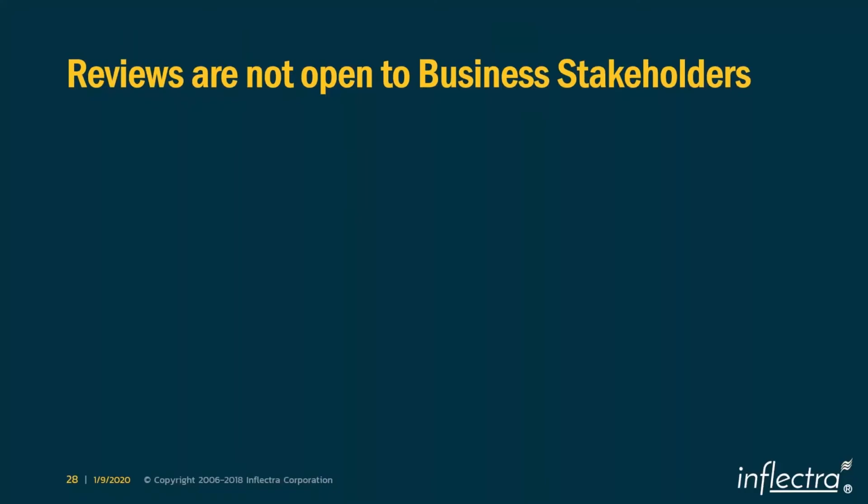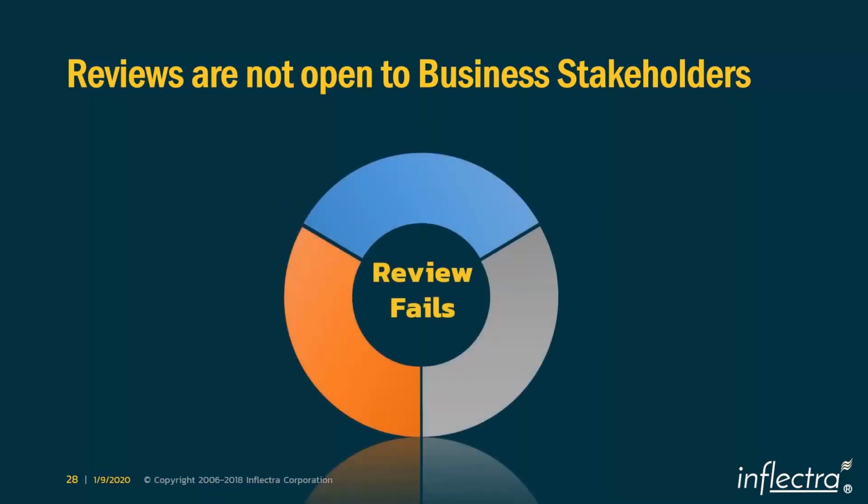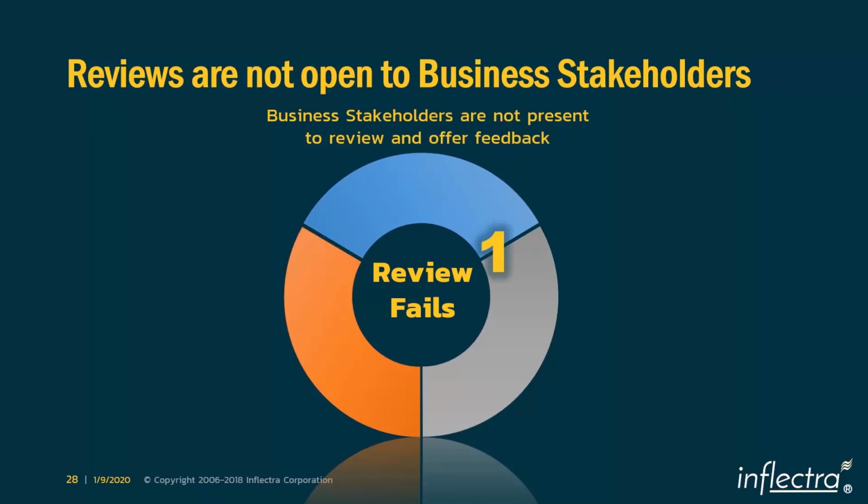Reviews are not open to the business stakeholders. One of the important things about the review session is primarily for different stakeholders to look at the demo, look at the work in progress or work completed and provide feedback, because it's an opportunity to gather new ideas, new feedback and all those things and continuously groom the product backlog. And those review sessions are primarily fading because we are not opening that review session to other stakeholders.